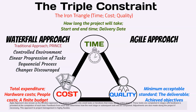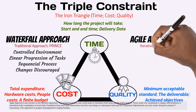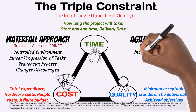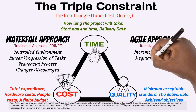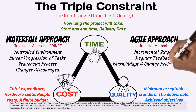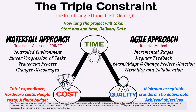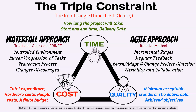The agile approach, also known as the iterative approach, breaks the project into small tasks or iterations that make up the entire project. These tasks are completed in stages and feedback is provided at the completion of each task. Feedback from each task determines how the next stage or subsequent task will be completed. Adjustments are also made along the project if necessary. This approach to project management is highly flexible. Neither of these approaches is better than the other, as no one project is the same — the project and its objectives determine which approach is suitable.